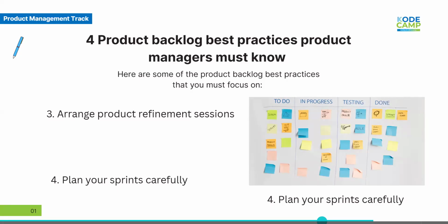Don't just move tasks blindly. Sprint planning is not a checklist, right? It's a conversation. Ask questions, right? Ask, do we have the capacity for this? Is this ticket too vague? Should we break this into two stories? Can we test this properly within this particular sprint?